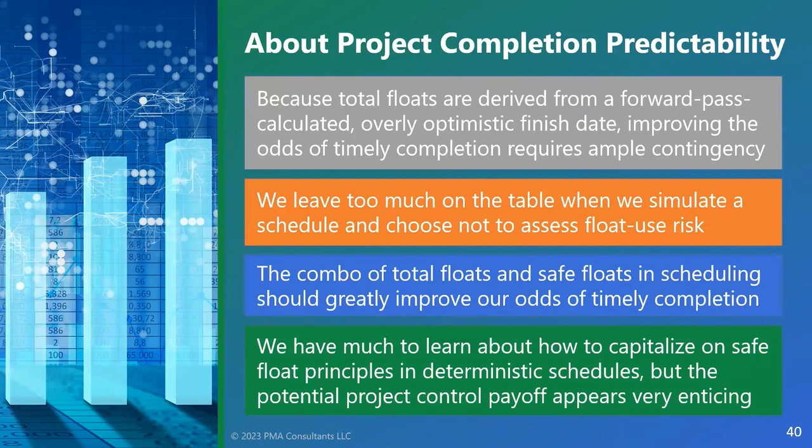The simulation will take those kinds of risks into account and actually generate bimodal distributions in those scenarios, if that's what you were referring to. So no, it does not always base it off normal distributions. It is the distribution which will come out from the simulation that will be taken into consideration for the Safe Float calculations. Okay, thank you.